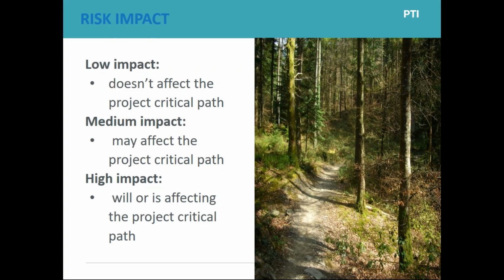And looking at the project as a whole, if you go to those countries, how long is it going to take to get improvement? If you have your backup country as one that has a long regulatory process, that really isn't something that is going to have a quick impact to reduce your risks and to mitigate them. So it's a matter of thinking, what is your backup plan and does it make sense?